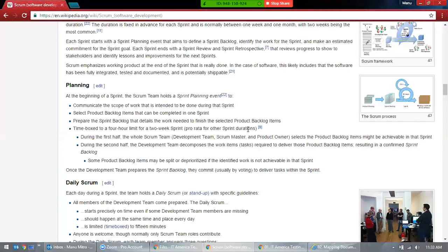The product backlog is pretty high level. After that you decide how much time it will take to complete the product backlog, let's say 4 months. Now we have decided the time, and we need to be more specific. That is requirements, user stories. In waterfall they're called requirements; in agile they're called user stories.